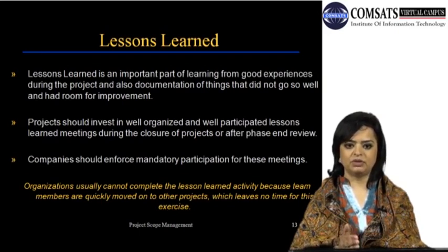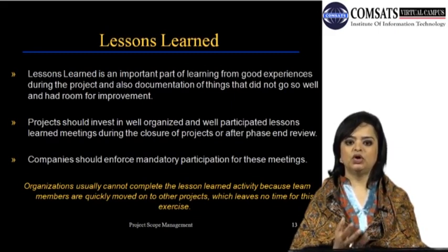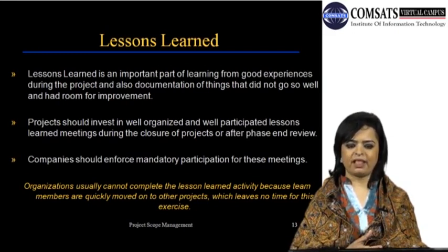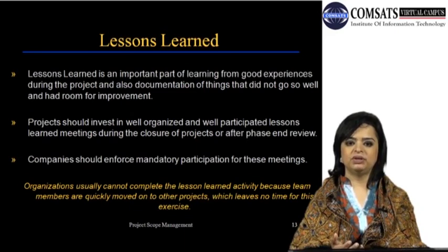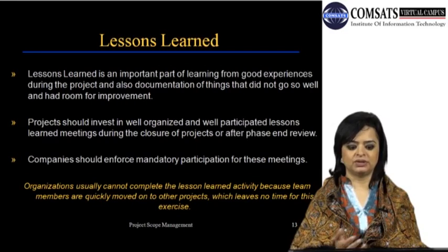So everybody comes in prepared, they all pitch in, they all have two or three things that went well and two or three things that did not go very well. They come in with this, and then there's room for discussion. It's all documented and shared with the team and stored in a place where this information can be retrieved for future projects by future project managers and other project managers.